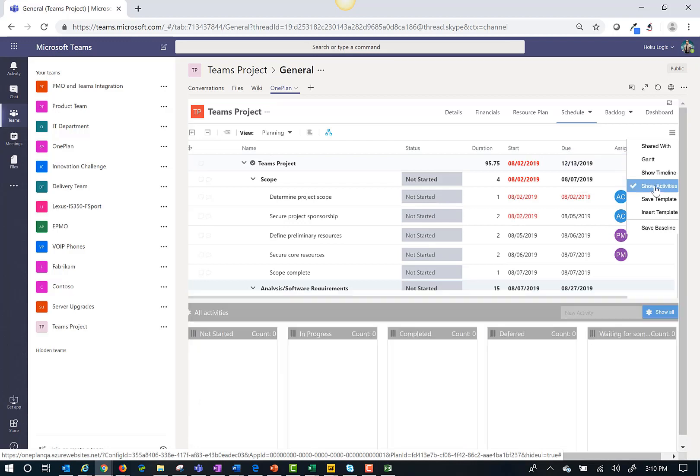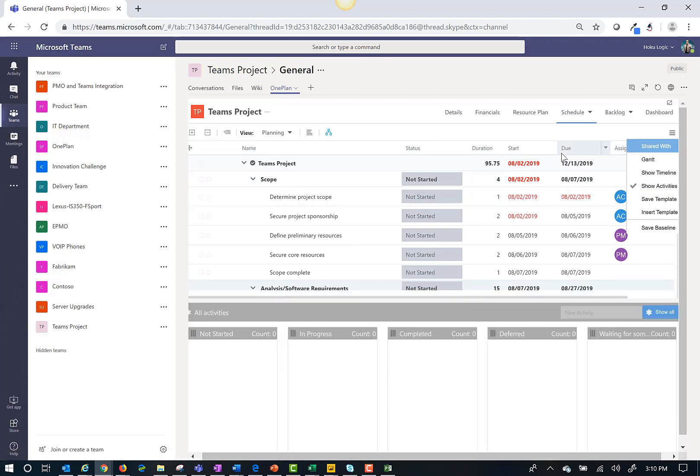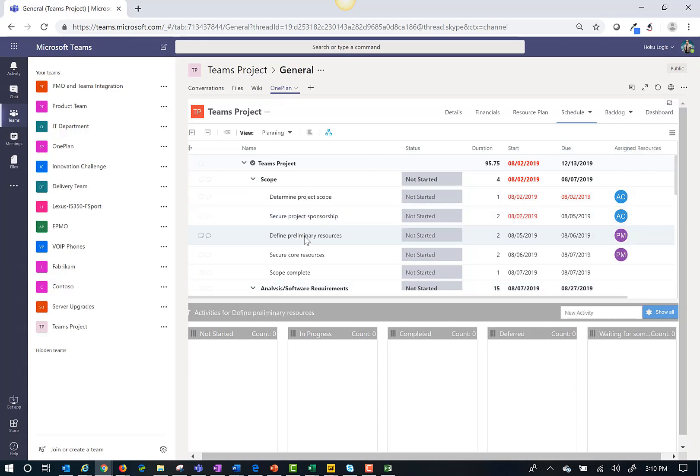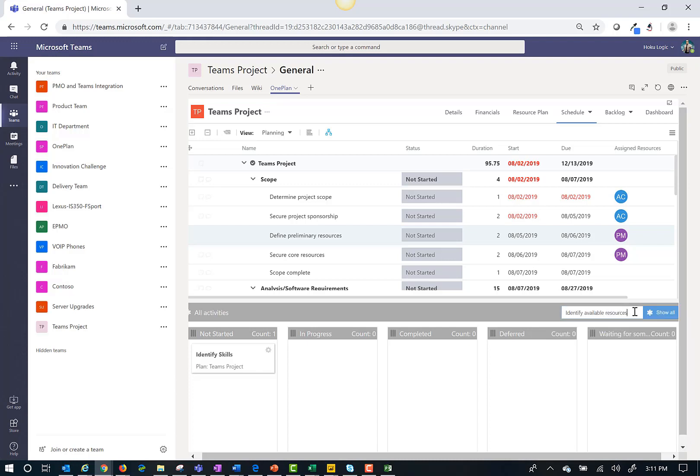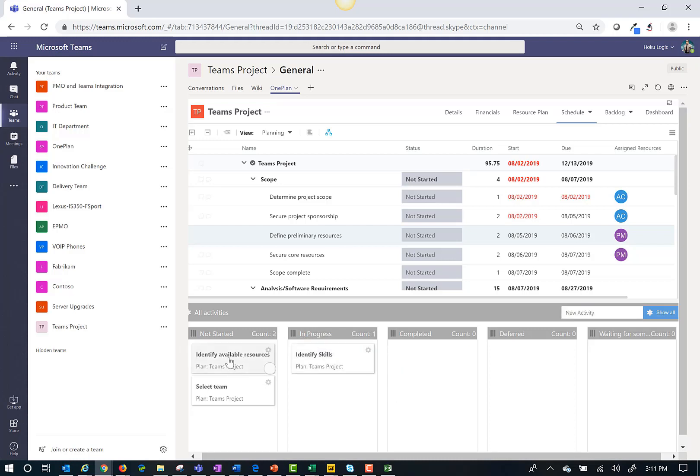A nice feature is that I can add a Kanban board to do lower level task planning within the overall project schedule. For example, for Define Preliminary Resources I may have activities to complete for that task such as identify skills, identify available resources, and select team. So we can manage those to-dos here.